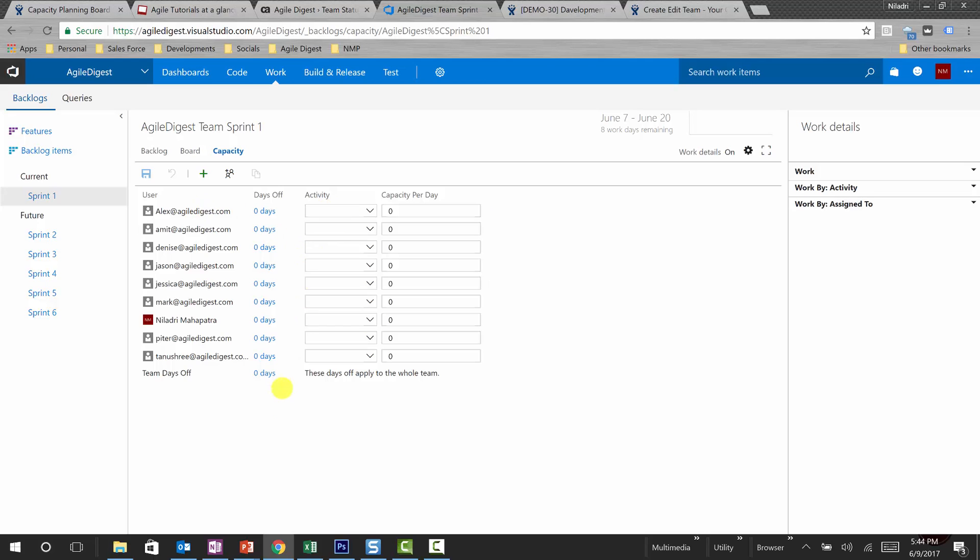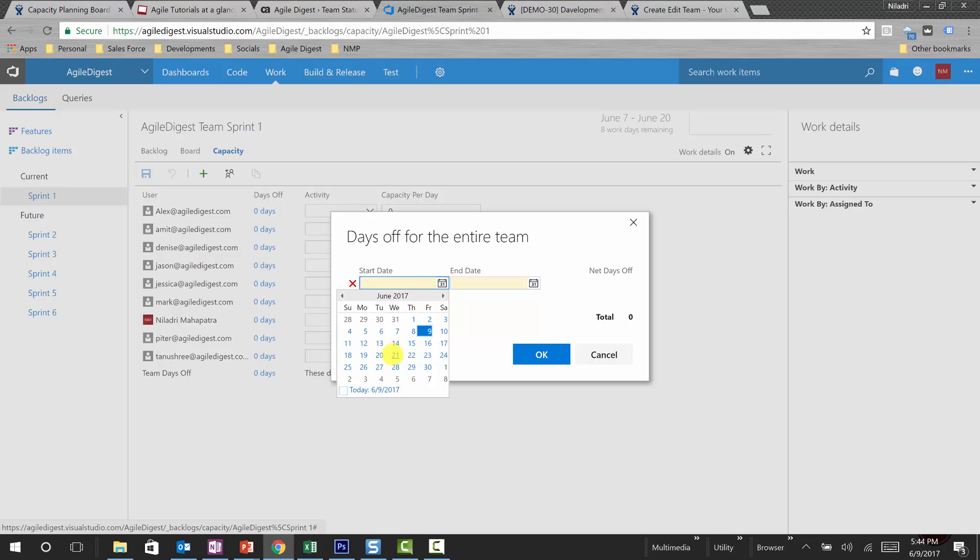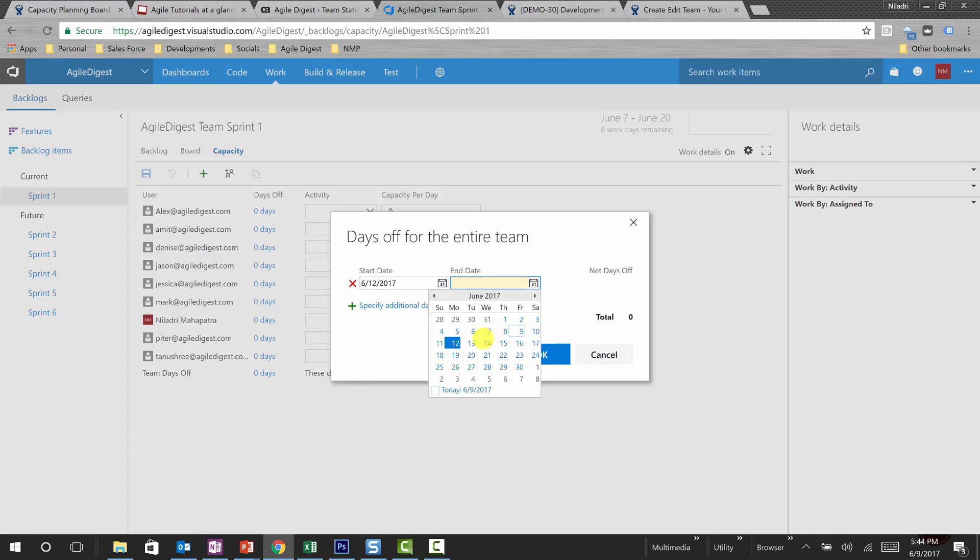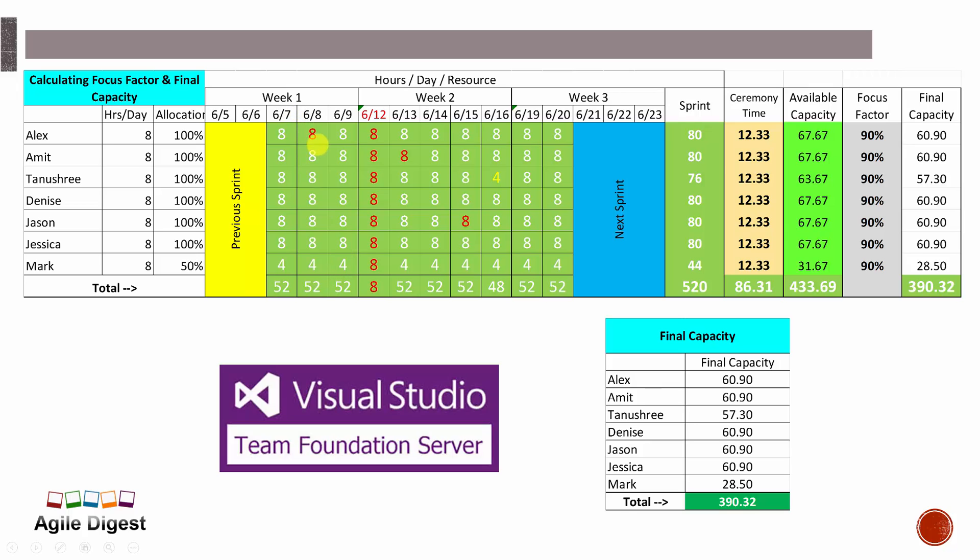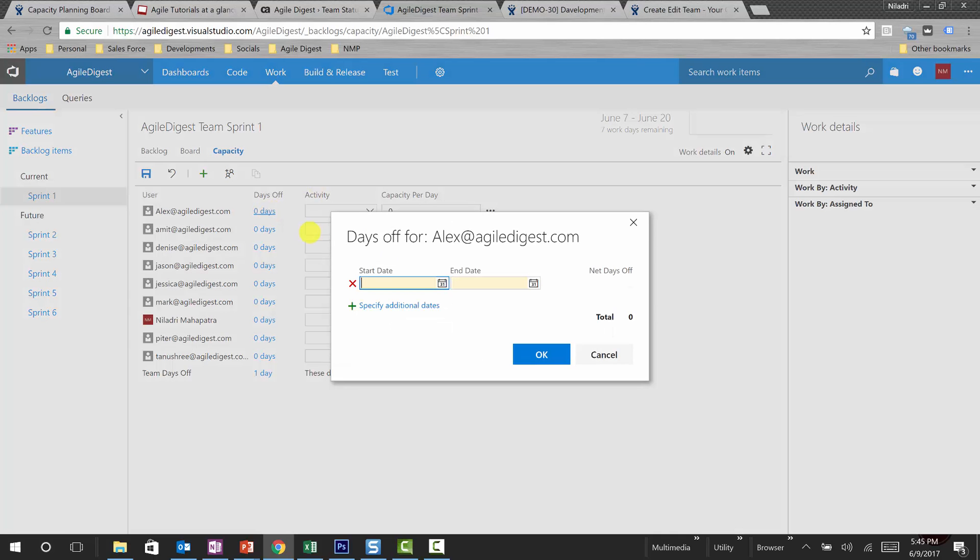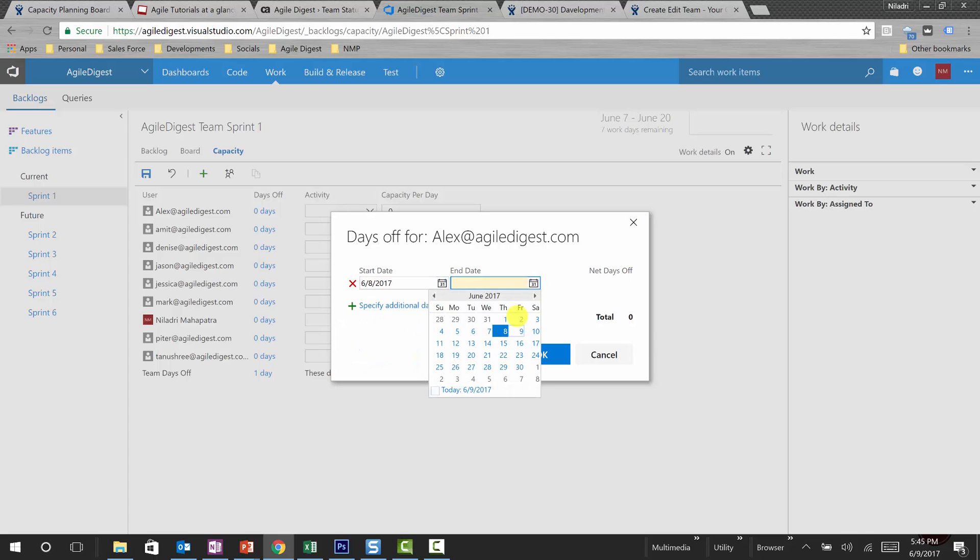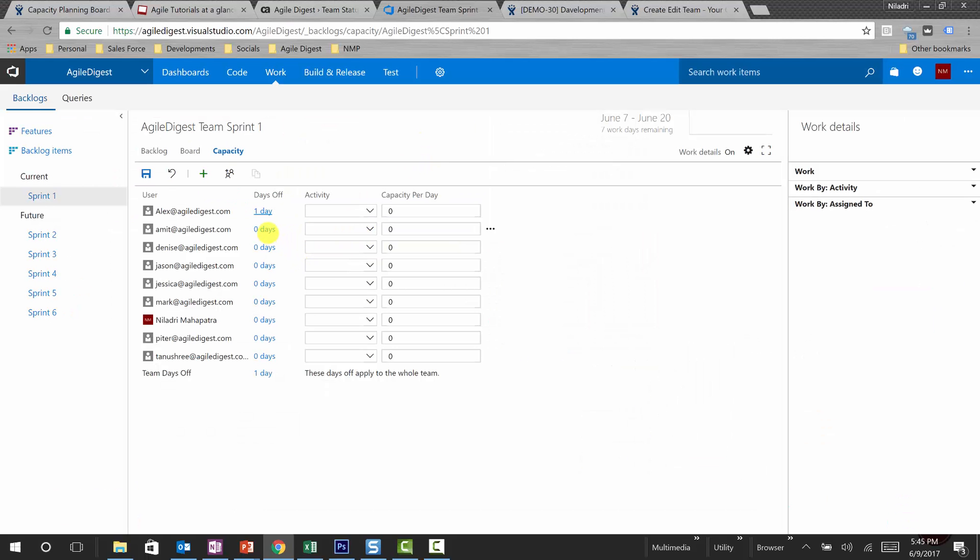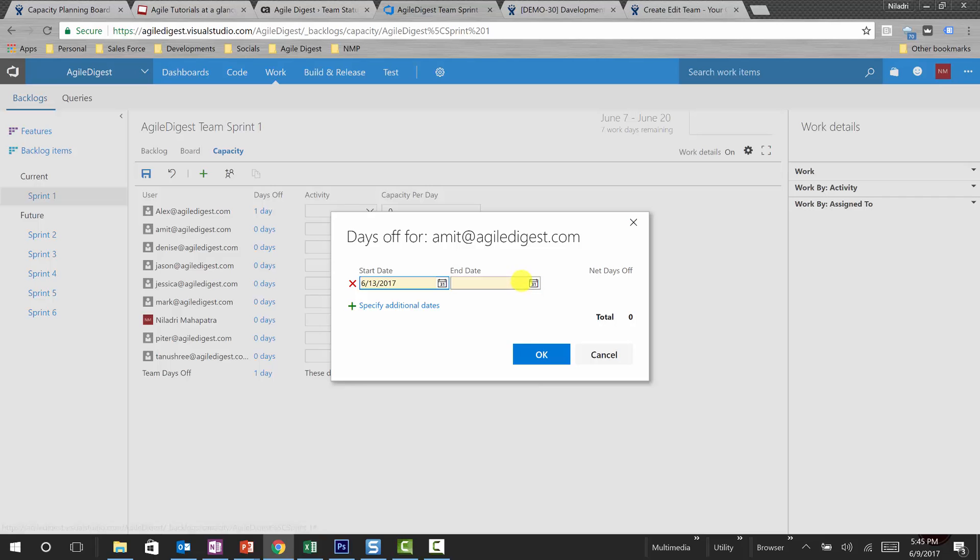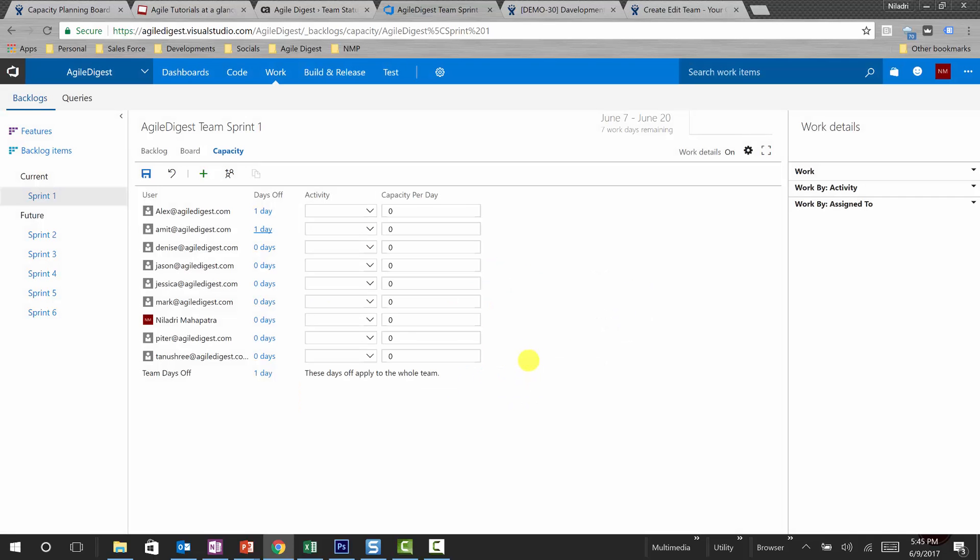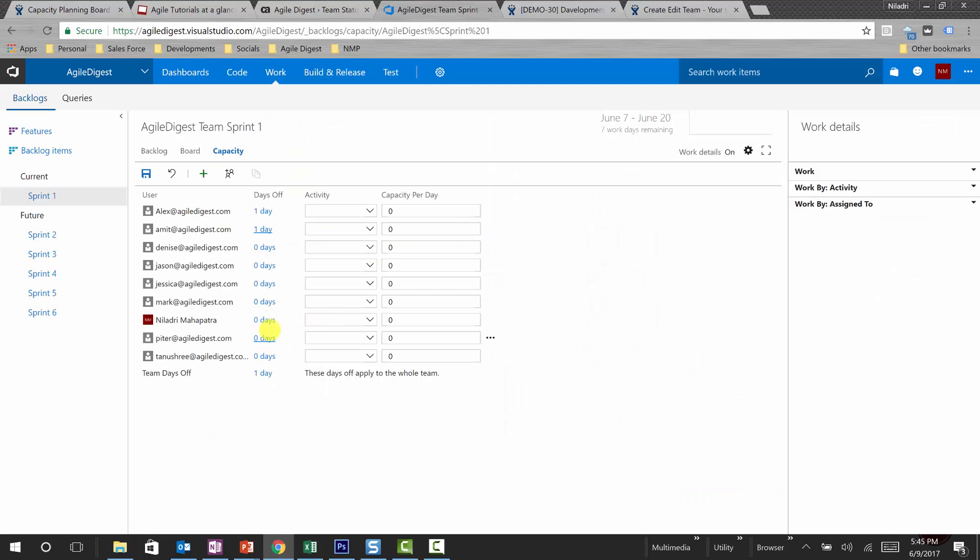Now again, if we look into our calculations, we have a holiday on 12th. So we will be marking a team holiday on 12th, ending on 12th. We mark one day as off. Then there were a couple of individual holidays. Alex on 8th was an individual holiday, so we'll mark one day for Alex. Amit was on planned off on 13th, so we'll mark Amit for 13th. And we mark Jason's 8 hours for a full day, that was 15th.